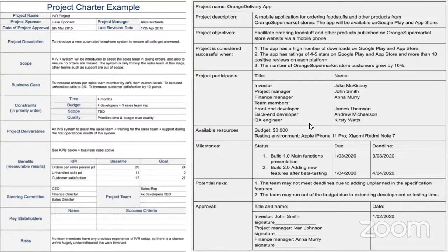Okay, the high level time scale here just gives you the major points at which your project will be delivered. So if your project is 24 months, you say it's 24 months. That 24 months is a high level time scale. That means at 24 months, we're expected to deliver this project. Now, if this project has specific points within the 24 months that are critical, we could also refer to them as high level.